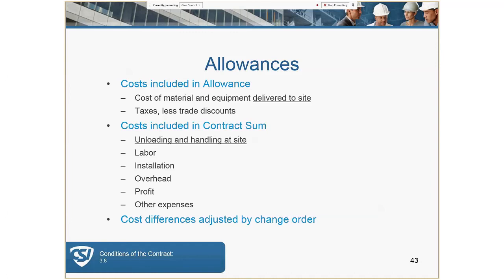Allowances might be used for materials not necessarily selected at the time contract documents are issued for bidding — for example, carpet or AV equipment. Allowances need to cover the entire cost of work: labor, material, delivery costs, taxes, etc., and are usually charged on a unit cost basis. Any balance within the allowance not billed is credited back in the form of a change order, including the GC's overhead and general condition costs.